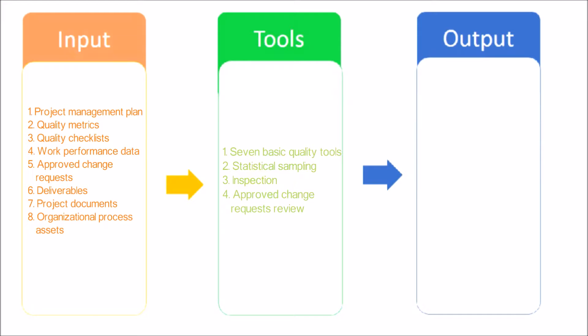Inspection: An inspection is the examination of a work product to determine if it conforms to documented standards. Approved Change Requests Review: All approved change requests should be reviewed to verify that they were implemented as approved.